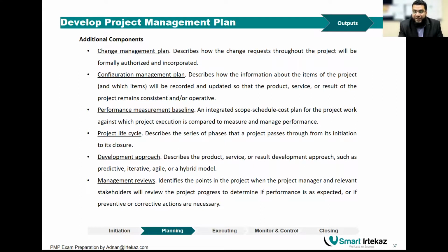For example, monitoring of this slide, right? I've shared with you. Can you change the slide? No, you cannot, right? Because it's shared in PDF. But let's say if you convert and you change and you still share, all right? But what we have in our records, that's not what you change. You just change your copy, all right? So we have configuration management, which is under our control. So this document, you cannot change without a proper approval or going through the proper change control process. So that's where configuration management is, where you have all the documents, all the elements of the project, and it's supposed to be monitored and controlled.